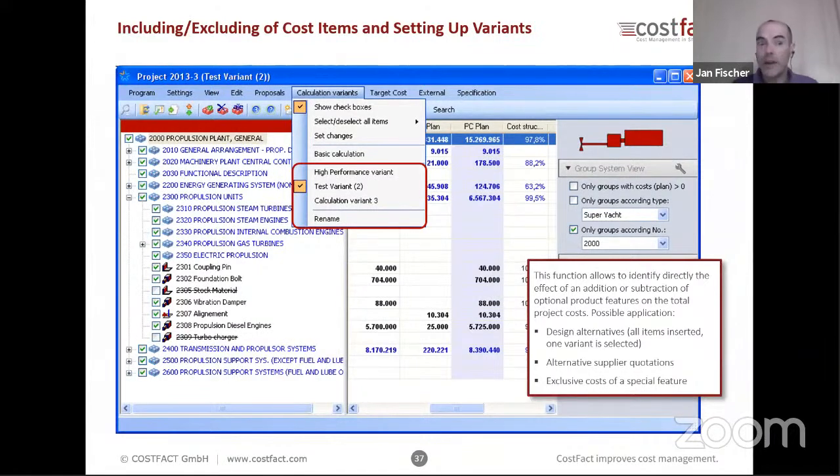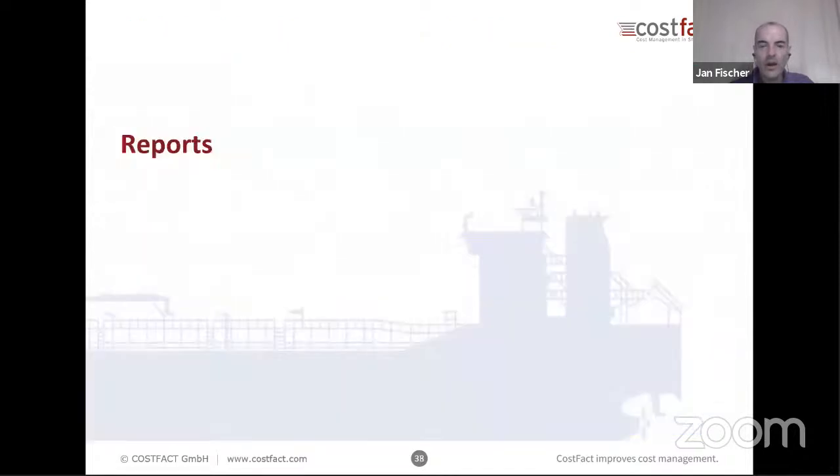And perhaps then you can make two different quotations to your supplier. The first one, which matches exactly the specification, and then perhaps another one where, with your own knowledge, it's only a very, very small reduction of the capability, but a great reduction in cost. Then you can perhaps propose it as an alternative to the basic design. So that is a basic approach from cost fact, different costing approaches.